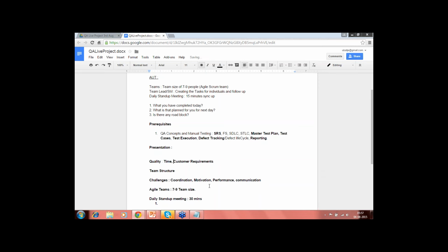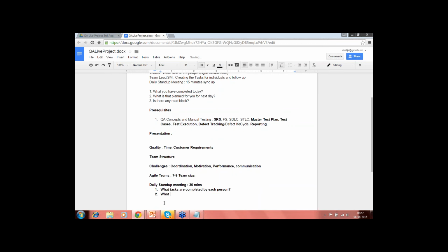Okay. So what you guys should do is meet daily for 15 to 20 minutes and talk about what tasks are completed by each person. The second thing you should discuss is what task he or she is planning to complete, and you should talk about any roadblocks.